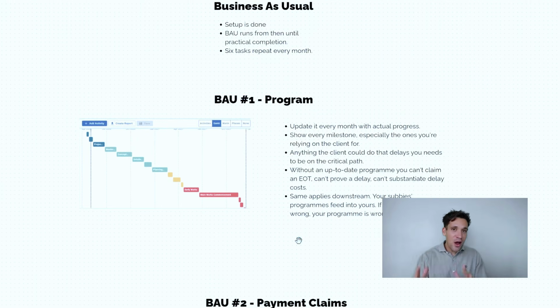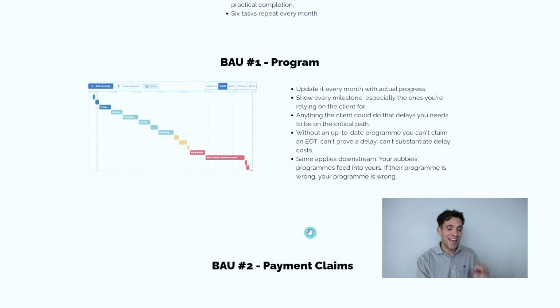Again, without a maintained and relevant schedule, it will be so hard to make any time-based claims. Through the schedule is how you recover your preliminary costs and avoid liquidated damages. So maintaining it and making sure it is relevant is absolutely essential.